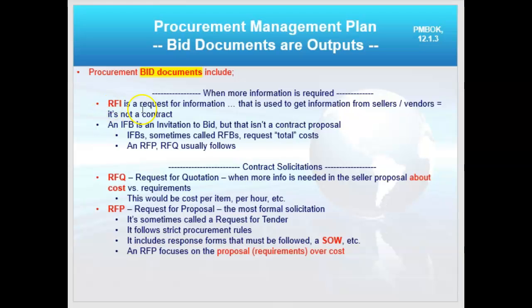So you have to decide which of these would be necessary. I commonly use an RFI first, let a lot of vendors contribute, pare it down to maybe 4, do an RFP, pare it down to 2, and run a proof of concept in IT.